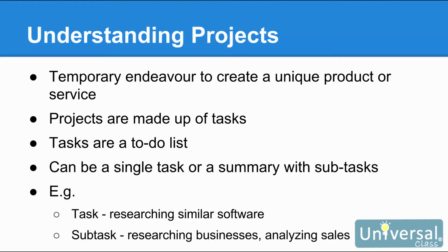A task can simply be researching the competition, or it can be a phase of your project that contains a summary task as well as a subtask. For example, if you are creating a new software program for your company, your task might be to research similar software. Subtasks might be researching businesses that have similar software, analysing their sales, and then looking at their pricing models.